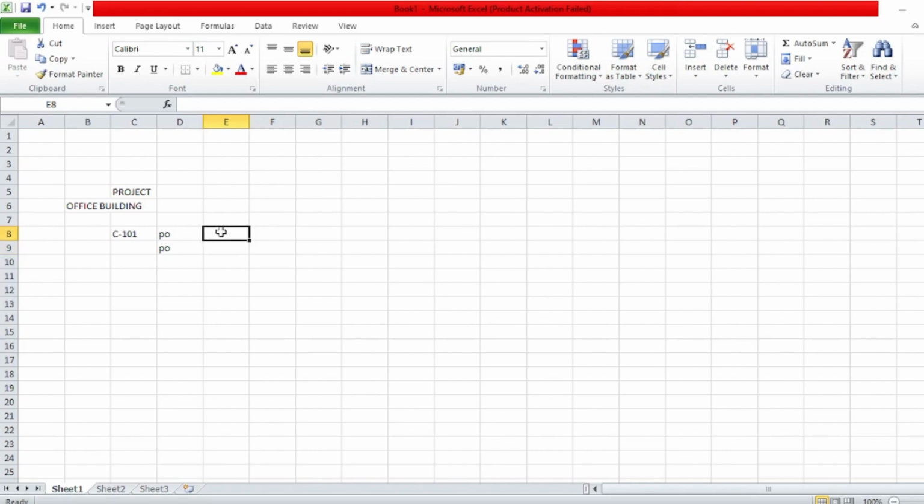While booking that PO, we will insert a WBS number inside those POs, or if we are directly posting expense accounting entries, we will insert a WBS number inside those accounting lines. So this WBS element will hold all that expense balance.